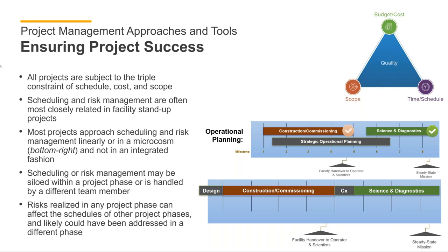Now the reality is that an integrated operational planning effort requires a dedicated team who has insight and vision of each of these phases, understands the risks that are associated with each, and understands how those risks or scheduling nuances affect the other phases as well. You don't want separate design scheduling efforts or separate design risk efforts that are not connected to or are not thinking about how those risks, if they materialize, might affect science and diagnostic program stand-up, even if that comes several years down the road. The reality is that risks that are realized in one project phase, such as design, may have an impact on project phases further down the line, like I said about science program stand-up.